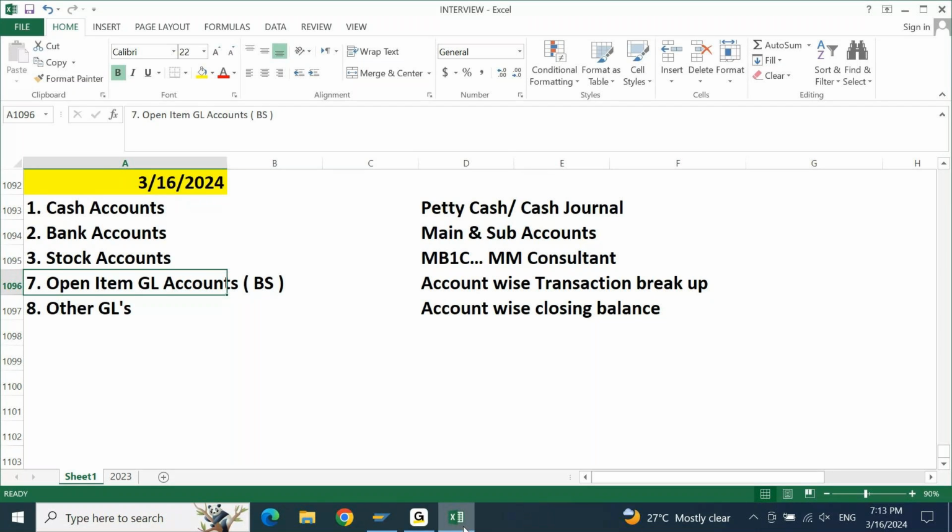rollout, you will be moving out from the project. There will be an end period for the implementation rollout project. On that end date, you will be moving out from the project. Somebody else will take over from you, meaning another support team will come in. There will be a support consultant. To that support consultant, you have to make sure that all this knowledge is shared.